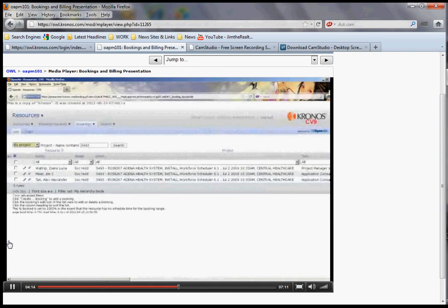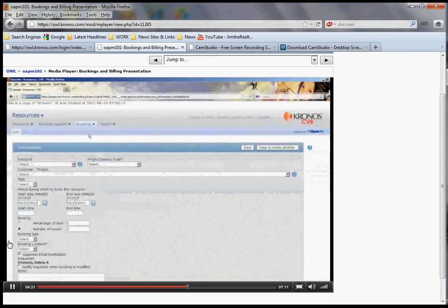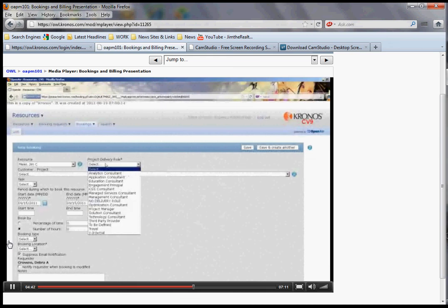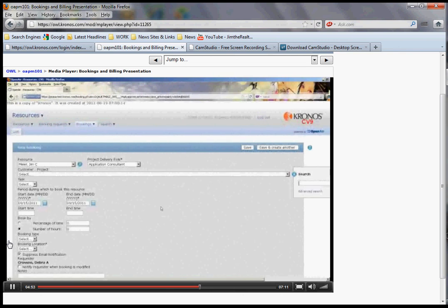What I need to do is, because Jim was already booked to my project, I can go out and create a new booking for him for that date of September 19th. So I'm going to go up here to where it says bookings, and I'm going to say new bookings. And I'm going to select my resource. I'm going to type in Jim's last name, and I'll select him. In the delivery role, I know that Jim is scheduled as my application consultant, so I'm going to assign him the delivery role of application consultant.